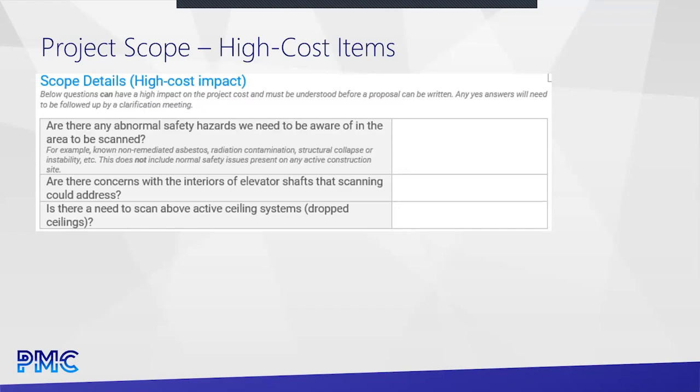So, if we were to come out and scan a high school, let's say, and we were going to be out there 200 hours to do the floor level, right? You should expect us an additional 500 hours to do above drop ceiling. I think I did that math right. Yeah. So 200 hours to just do the floor level, an additional 500 to do above drop ceiling. There's ways to reduce that. There's ways to talk that back and make it more reasonable.